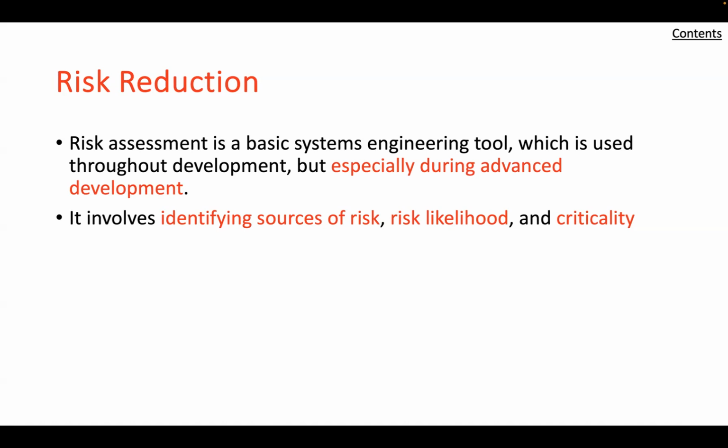Other risk reduction strategies are available to both the program manager and the system engineer. From the program manager's perspective, several acquisition strategies are available to reduce risk depending on the level of resources. One, parallel development of effort, developing alternative technologies or processes in case a primary technology or process fails to mature. Two, alternative integration strategies to emphasize alternative interface conditions. And three, incremental development strategies to engineer functional increments while technologies mature.